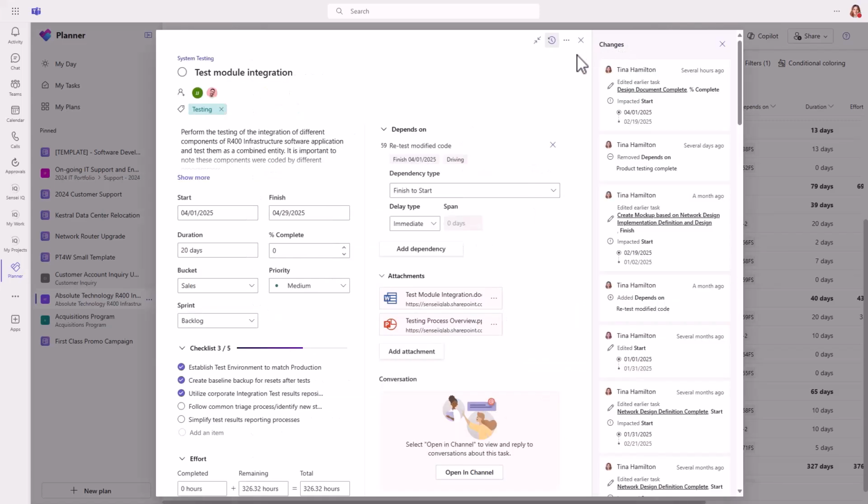You even get a complete task history so that you can track detailed changes on the task. This is a feature that goes beyond traditional baseline functionality, which really only recorded static versions of 14 fields. Task change history actually captures what changed on any field and shows who changed it and when. That's critical if you're managing a plan that other people have access to.